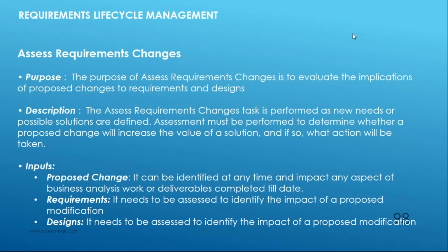So in such a situation, you might have to apply some prioritization techniques, such as you must have heard about MoSCoW: must have, should have, could have. You also have a couple of other techniques; voting can be one more technique. You assign votes to a particular requirement, and the requirement which gets the maximum votes would definitely become the highest priority requirement.